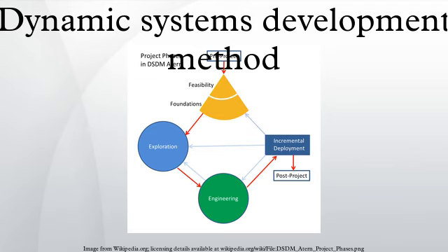8. Demonstrate control. Use an appropriate level of formality for tracking and reporting, make plans and progress visible to all, measure progress through focus on delivery of products rather than completed activities, manage proactively, evaluate continuing project viability based on the business objectives.